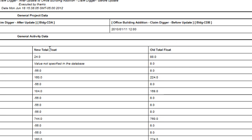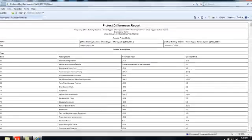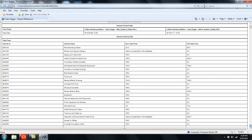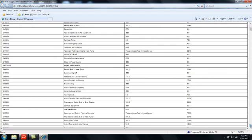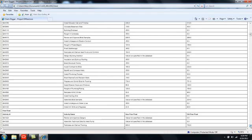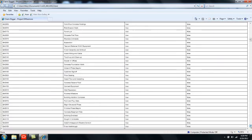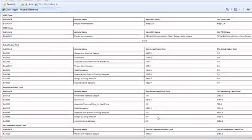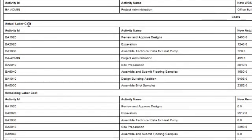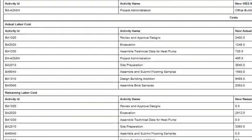And if I just scan through, you can see some of the other subject areas that can be evaluated. I can see any actual labor costs that changed, any remaining labor costs, at completion labor costs. It's actually quite extensive.